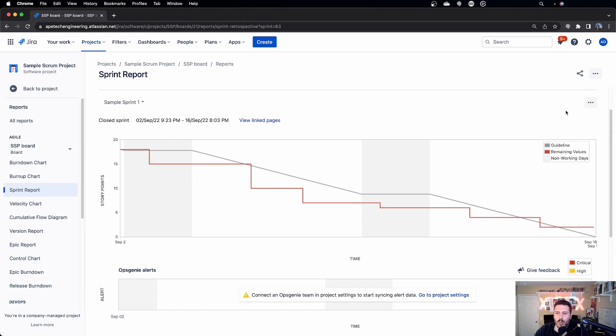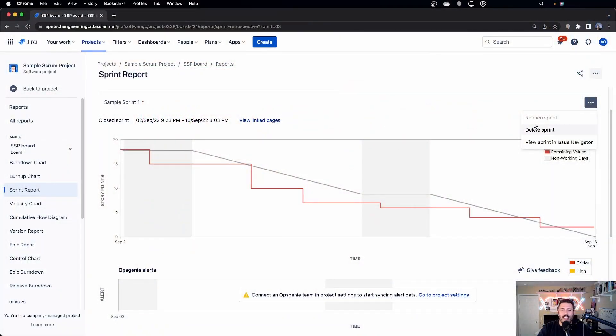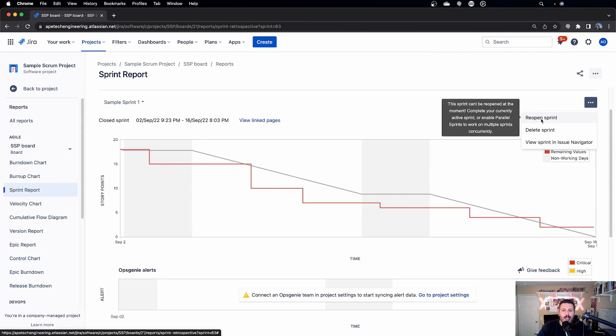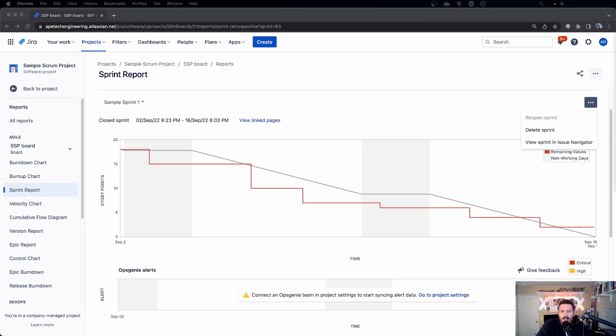One really cool thing you can do in the Sprint Report is come to this ellipsis here. If you ever get caught up in a situation where you accidentally close the sprint prematurely — where it shouldn't have been closed — you can actually click on 'Reopen Sprint', which will basically reopen that sprint. So if you're ever in that situation where you accidentally closed it, come to the Sprint Report and reopen it.